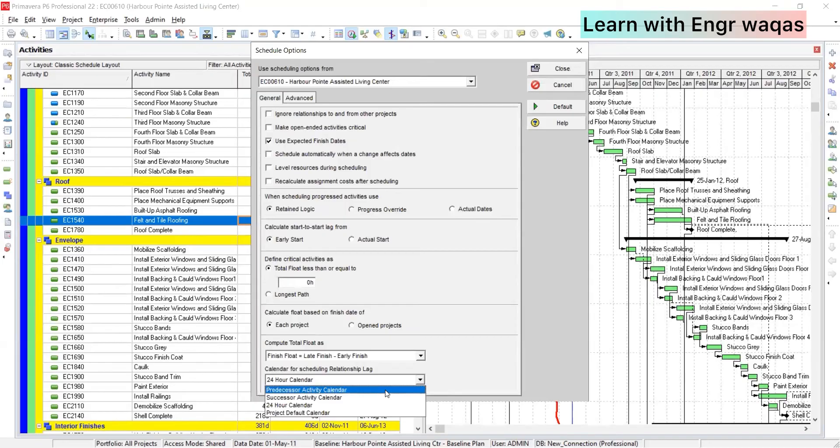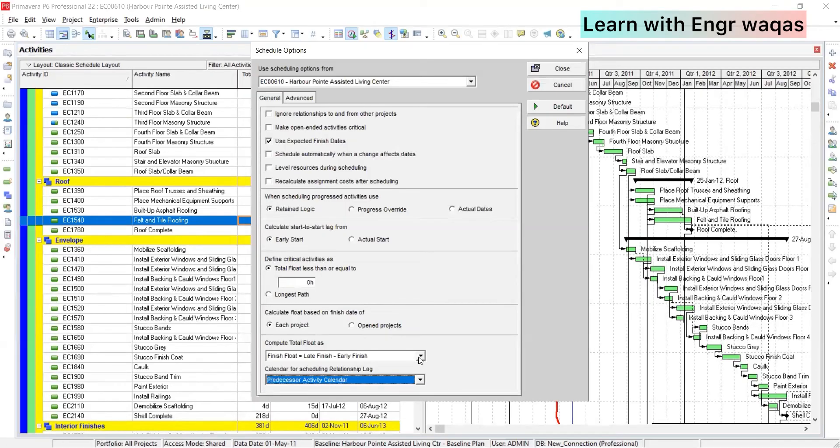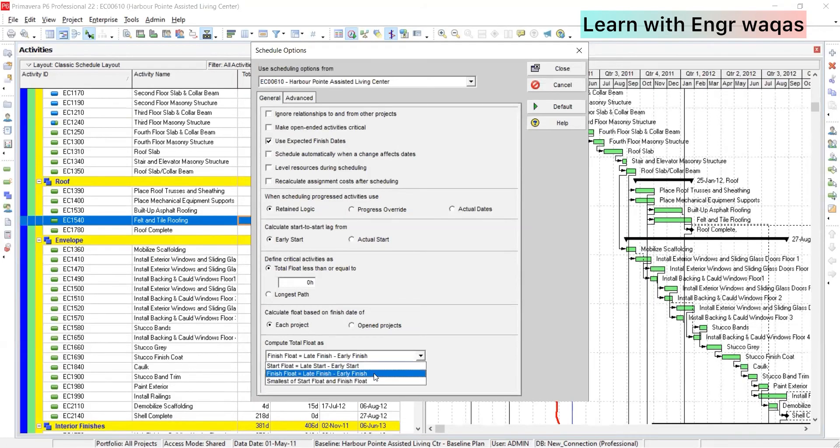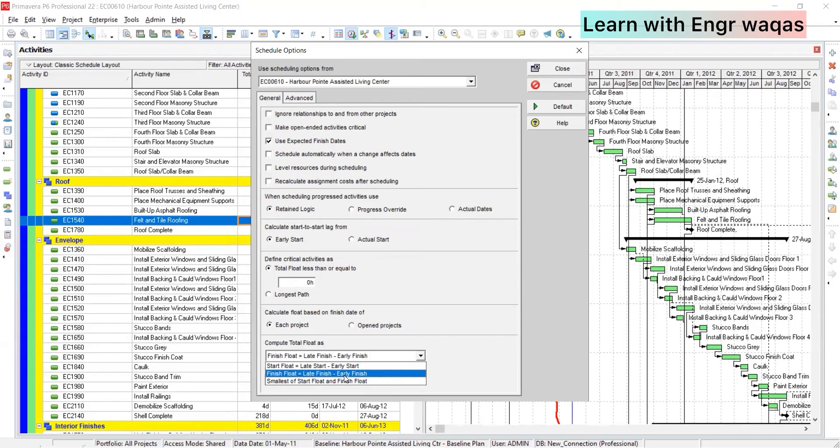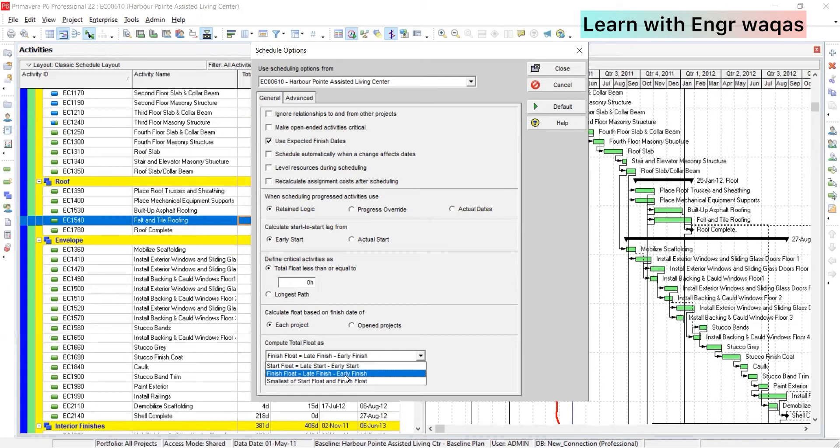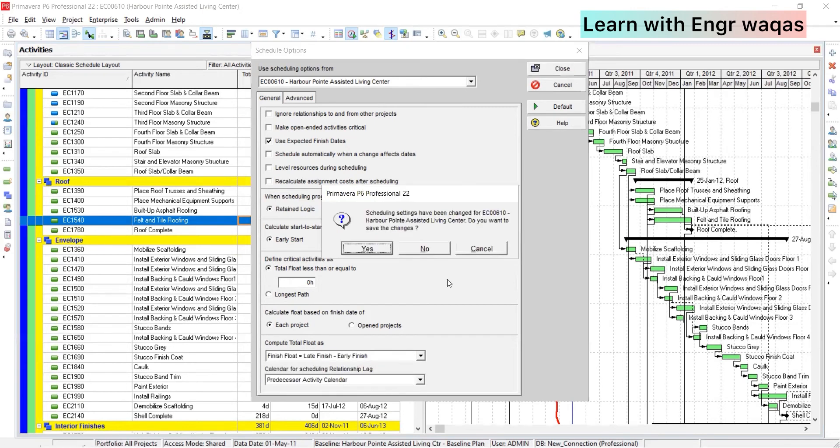So again I'm just suggesting you different kind of techniques you have to apply. Predecessor activity calendar, and there is a float - it's same thing, start float, finish float. You know what is the formula to calculate float? It is late start minus early start, or it is late finish minus early finish. In both cases it is same, unless until there is a client requirement that you have to incorporate some values by manual ways, then yes there is some constraint, there is some other way to calculate your float. Yes, then it can happen that it is going to impact on your project.